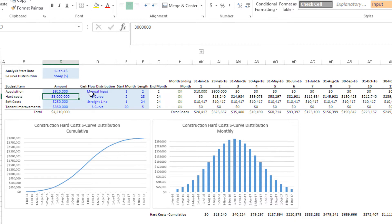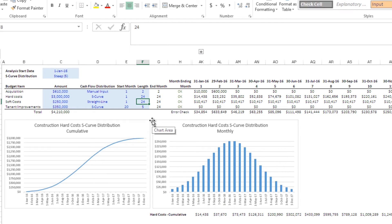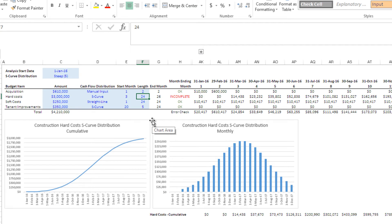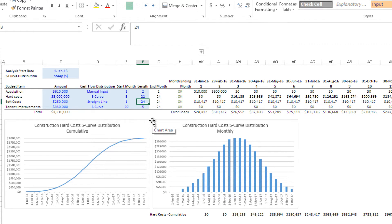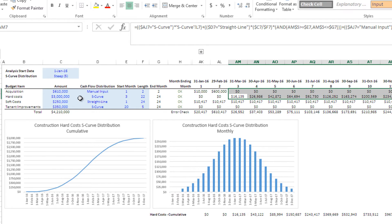Now hard costs: $3,000,000 distributed in an S-curve. We're going to start in month 3 — that's a 22-month length. You'll notice in the graph these two charts are only graphing our hard costs. Month 1 and month 2 have no outflows, and then a normal distribution curve distributes the $3,000,000 over these 22 periods. That's our hard cost.